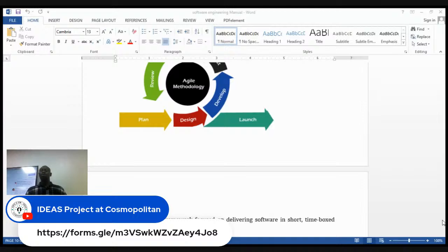So sometimes we don't just swallow what the client says. We go for information gathering to ask those questions that are key. And when we are done, we document it and show them, is this what you want me to do? And they say yes, you say sign. Once they sign it, Richard, are you listening? Once they sign it, there is no going back. Back and forth will not happen again because you now have a working document. If they want extra work, they have to make another payment and another agreement for that extra work. In that way, you will not go back and forth.